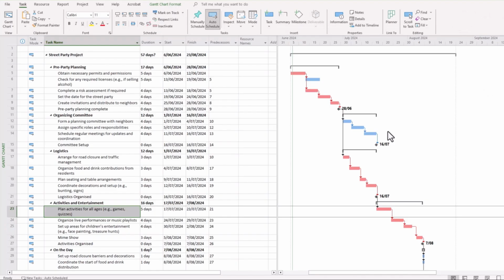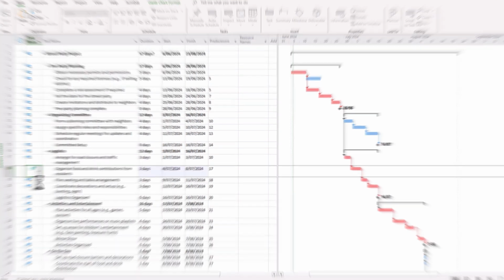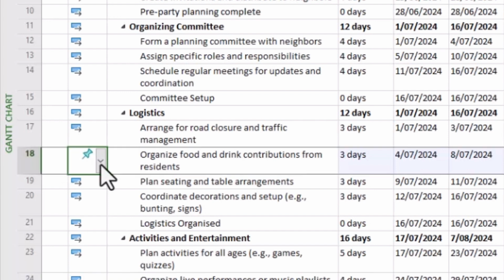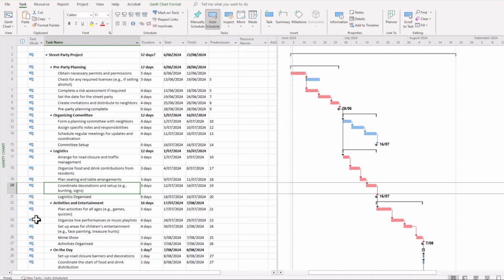Now, there are a few pitfalls, or in other words, common mistakes, that are worth reviewing so that we don't get caught up in these sorts of situations. And the first one is ensuring that our task modes are consistent through our project. As we already mentioned, there are benefits to ensuring all of your tasks are auto-scheduled. So if you see a task there that's got the little aqua or teal-like pin in there, you can see that is a manual task, and you will want to change that to auto-scheduled. So try and keep your task mode consistent in your project.